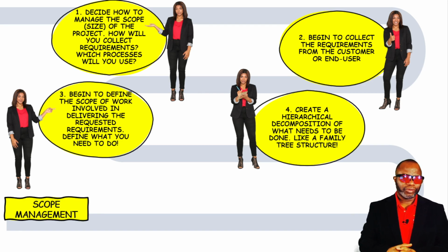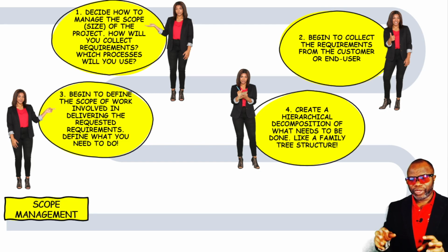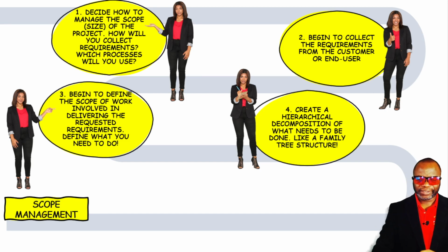Bear in mind, though, that the aim of the WBS is not to be chronological. We're not looking to arrange everything in a time-based order. That is kept aside for schedule management. So right now, we're just looking to show the breakdown of work. The schedule is what weaves it together chronologically, so keep that in mind.